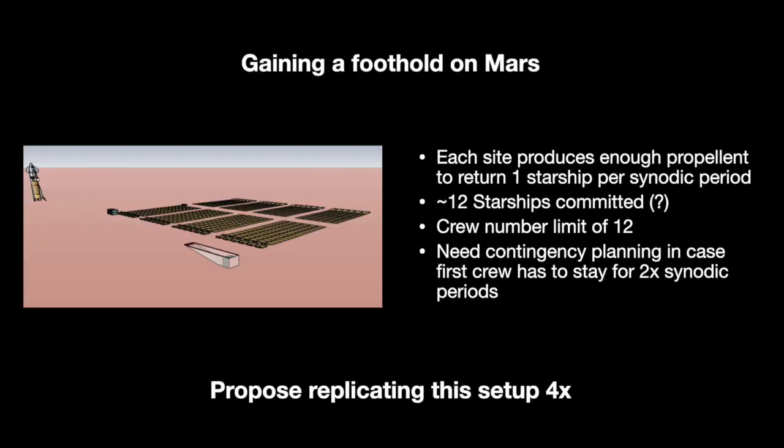Let's recap where we are at the moment. We've got a crew at a site which is capable of producing enough propellant to return one starship per synodic period. To do this, we've committed up to 12 starships, and we've got a crew of 12. But what happens if we don't manage to produce enough propellant in one synodic period to return that crew to Earth? Well, it's important that your architecture is robust enough, you have enough supplies with you, to allow you the contingency of staying an extra synodic period. In fact, given that you've already got up to 12 starships with storage on board, it might actually be better to plan for that first crew to be there for two synodics, and then as we add more sites, reduce the minimum necessary time spent. And I think there are a number of good reasons why that first campaign should aim to create four sites all within driving distance of each other.